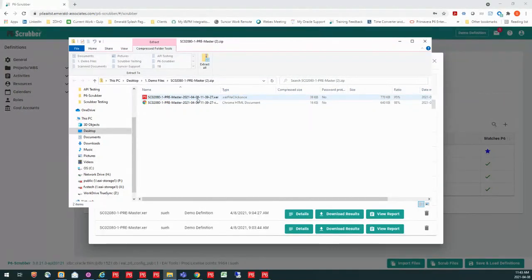I'm also going to get an HTML report of the report that we just looked at. That report is going to be helpful, like you said, with claims, or if I wanted to give maybe some feedback to my contractor who sent me that file. Just let them know, hey, I found these, this is what I'm doing to clean your file up. And perhaps you want to coach them as to what they could change.